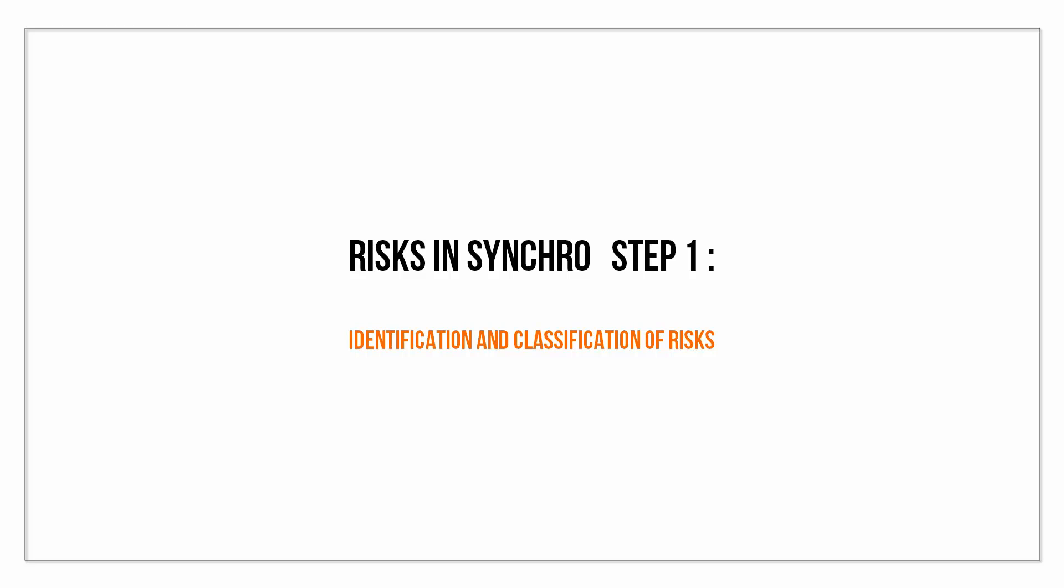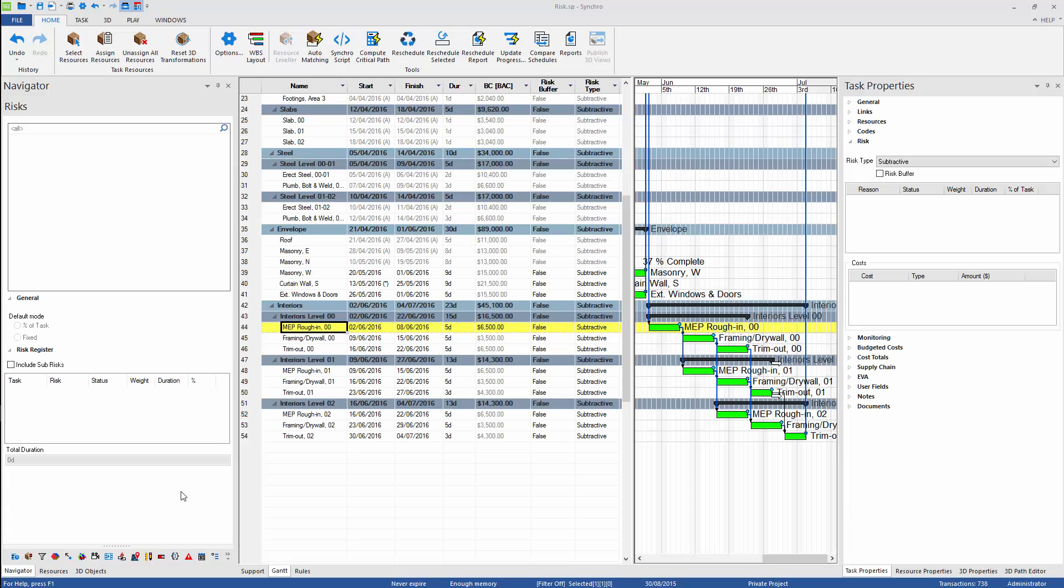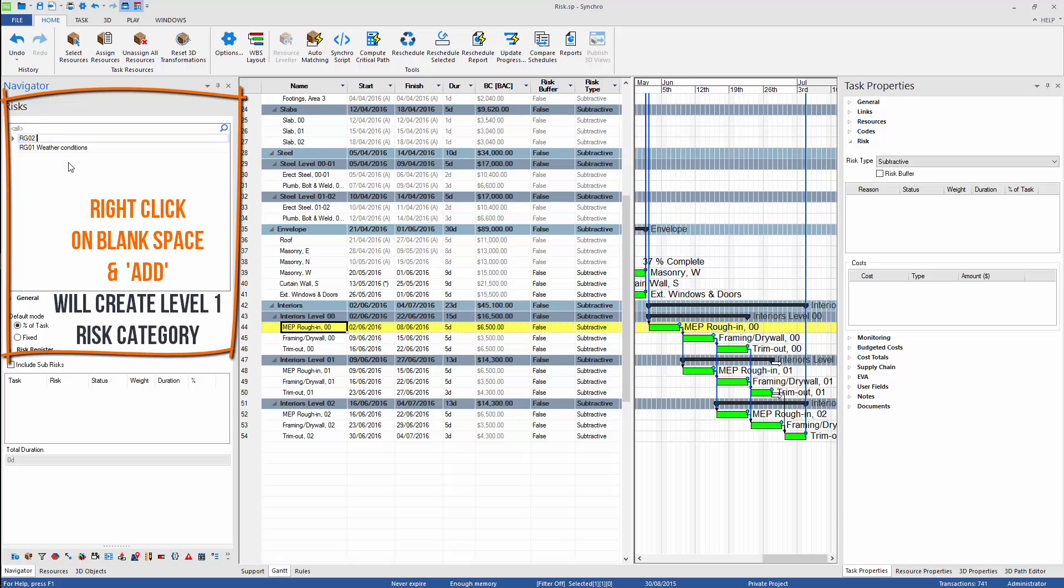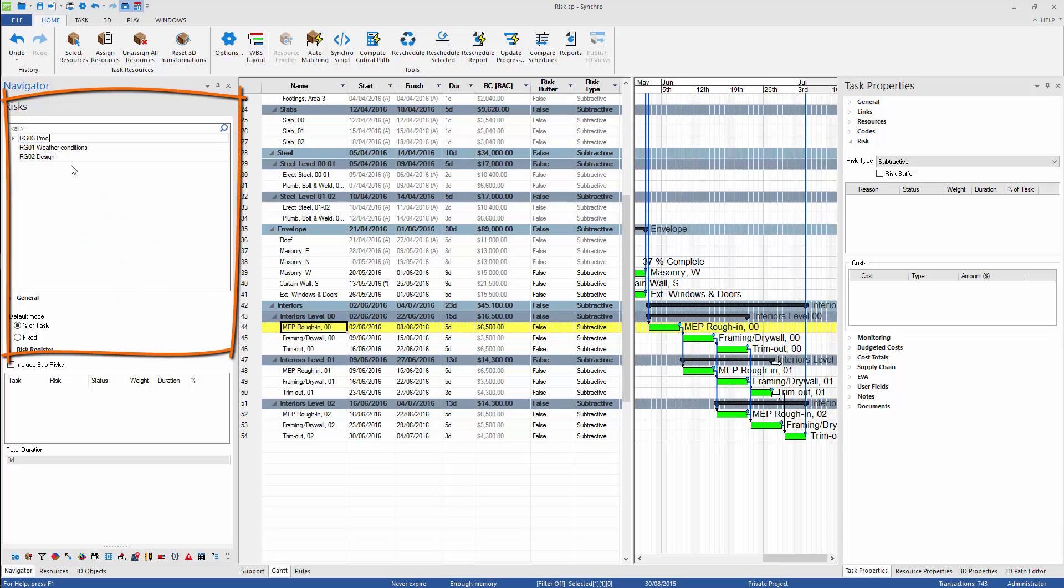We need to identify and classify risks before assigning them to tasks. Right-click on blank space and the Add command will create Level 1 risk category. I will add several categories and also prefix them so they are sorted alphabetically.